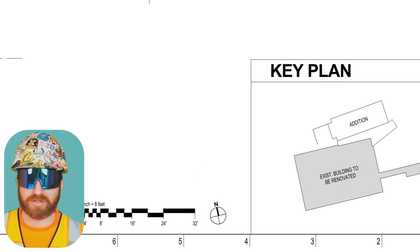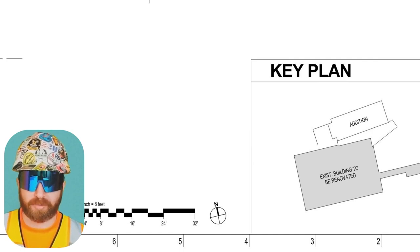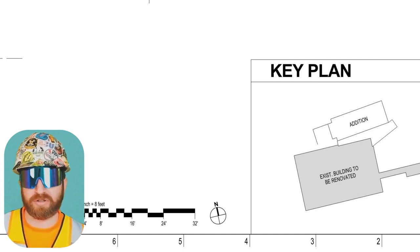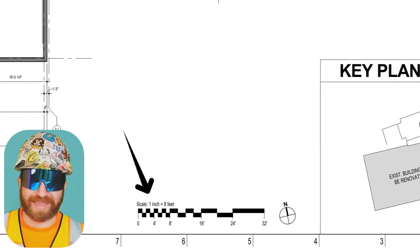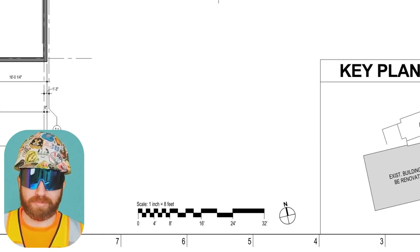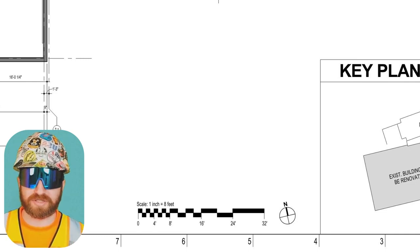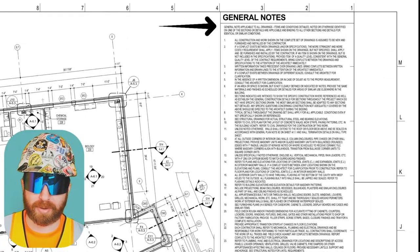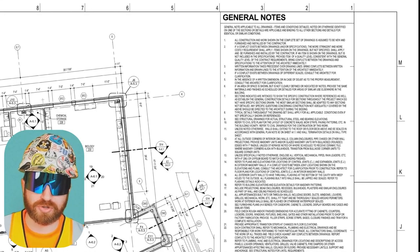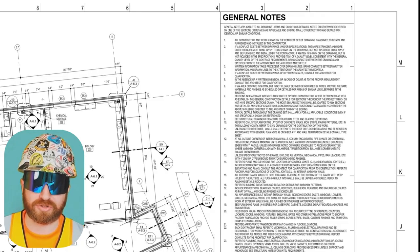The compass is beneficial because when talking to someone on the phone, it's easy to reference which side of the building we're talking about after familiarizing myself with the building's orientation. Next to the compass is a scale — obviously the real building can't fit on this drawing page, so the scale is critical. It shows the relationship of the size of different components on the drawing versus what they would be in real life, and it's essential when completing estimates. Moving to the right side of this page, we see sections called general notes. You've got to read these notes in full as they're applicable to all of the drawings and the information is usually critical.